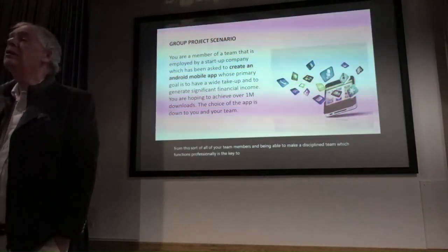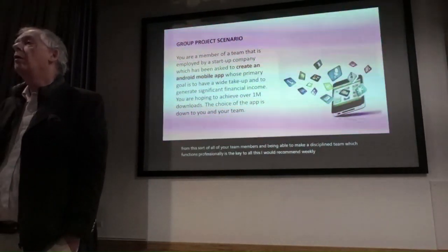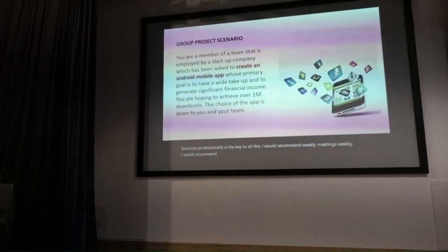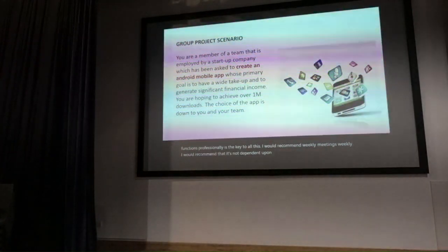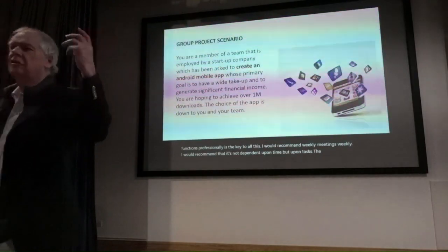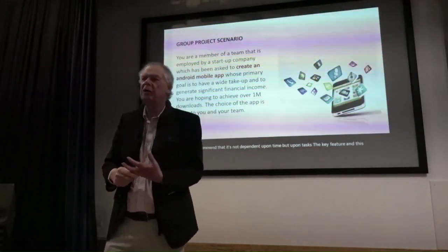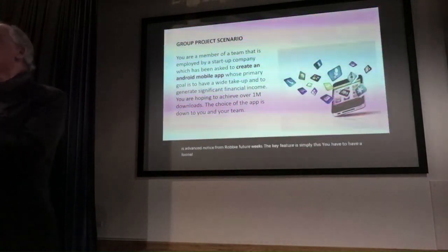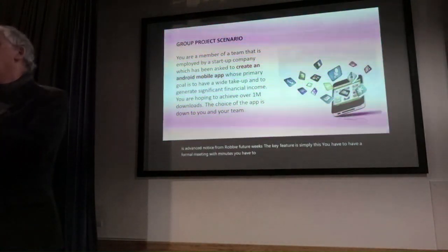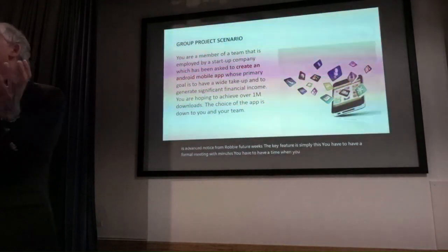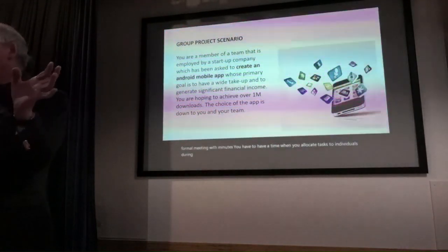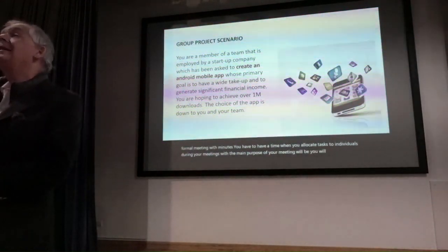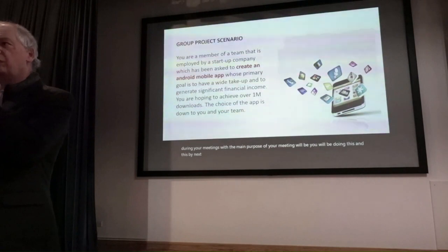I would recommend weekly meetings. Weekly, like an hour or two? I would recommend that it's not dependent upon time, but upon tasks. The key feature, and this is advance notice from probably future weeks, is simply this. You have to have a formal meeting with minutes. You have to have a time when you allocate tasks to individuals during your meeting. So the main purpose of your meeting will be: you will be doing this, this and this by next week. So you have to be small chunk tasks.